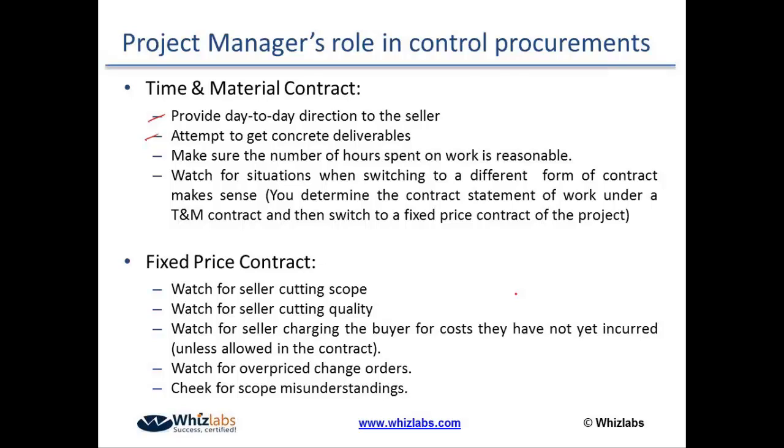Okay? For example, I want to paint the entire interior of my house. I don't know how much cost it would take raw material wise or labor wise. It's difficult to go for the planning at an initial stage. So I go for a standard market rate that it would be $10 per square feet. Now, after the work is done, there would be a measurement done. Accordingly, the invoice would be raised.